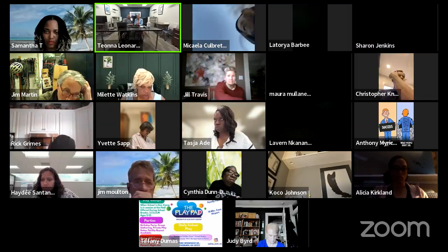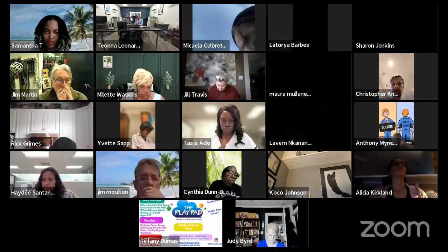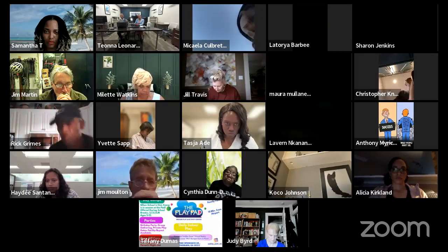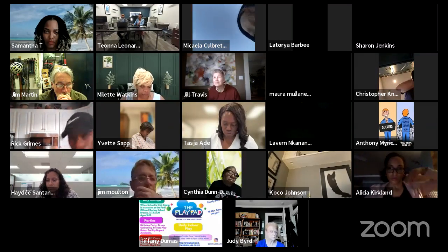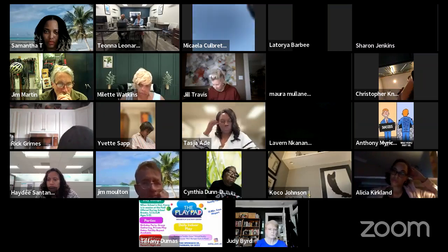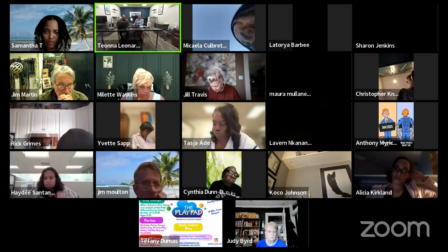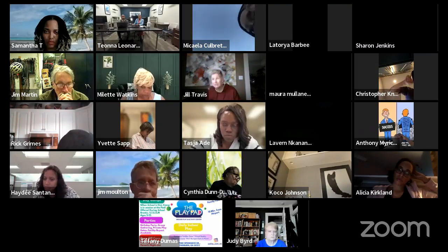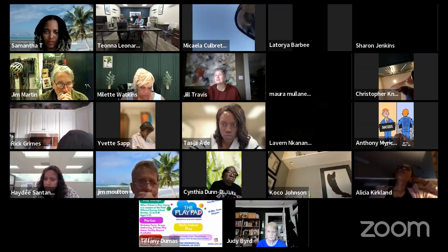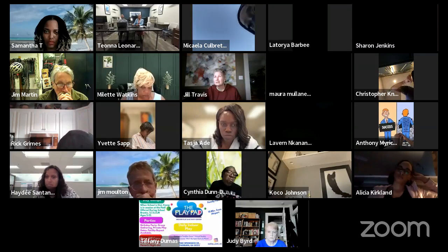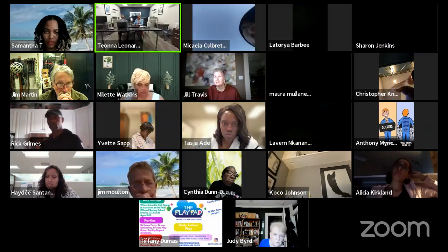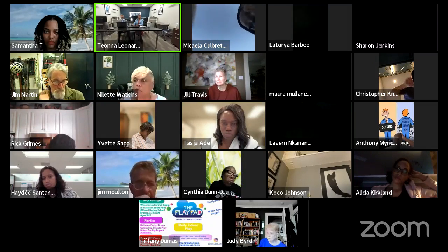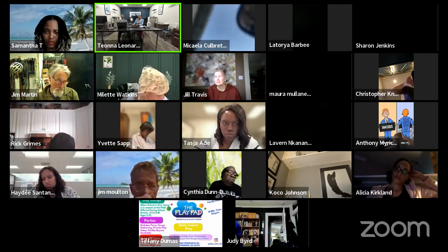Nicole. Yeah, so my question has to do with applying for a building permit for a townhouse. It's row style, so they're connected. The lot consolidation and zero lot line dividing, does that go through with the building permit or after that, or does that have to go through with SAPs? I wasn't clear on the muni code. That's a totally separate process. That's over with the Office of Zoning and Development. That is one of those pre-submittal processes.